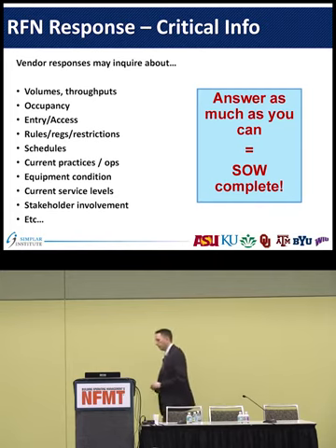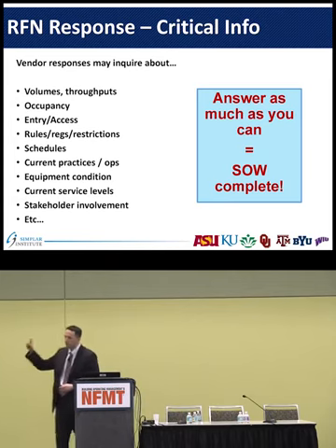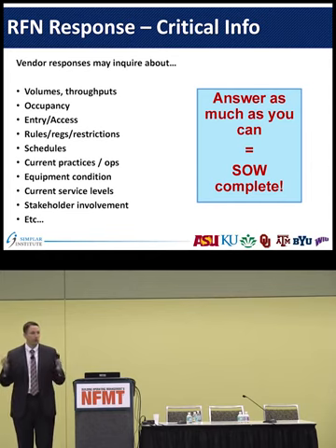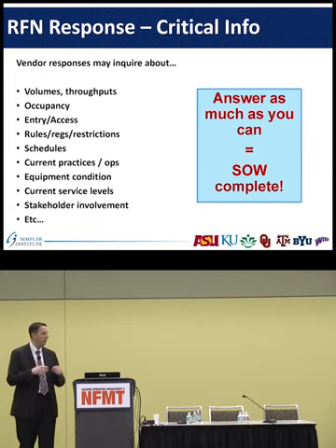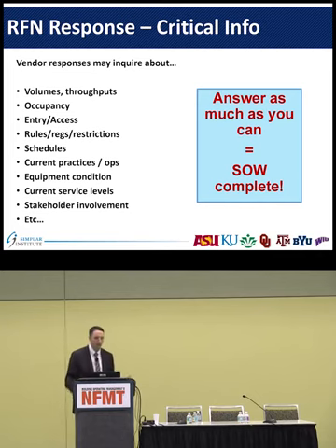I had a project recently where there was a scope of work. There was a bunch of questions that were asked, things like, you mentioned doing these practices, can you tell us more about what those are? Or can you provide us an example of what the previous vendors have done for that? The owner's response was, we don't think you need to know that, and therefore we're not going to tell you. It was literally verbatim that. I mean, that's crazy, right? The reason the industry is asking is to help minimize their contingency, so they can actually put together a better proposal. So if you're being asked questions, you should answer as best you can, right?